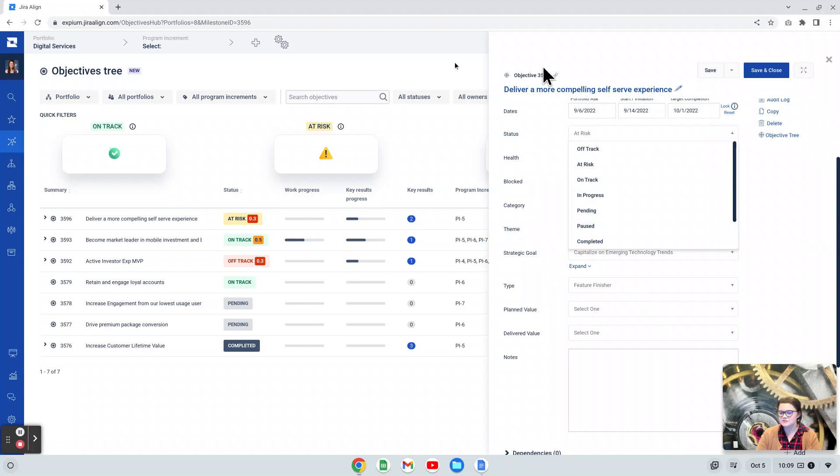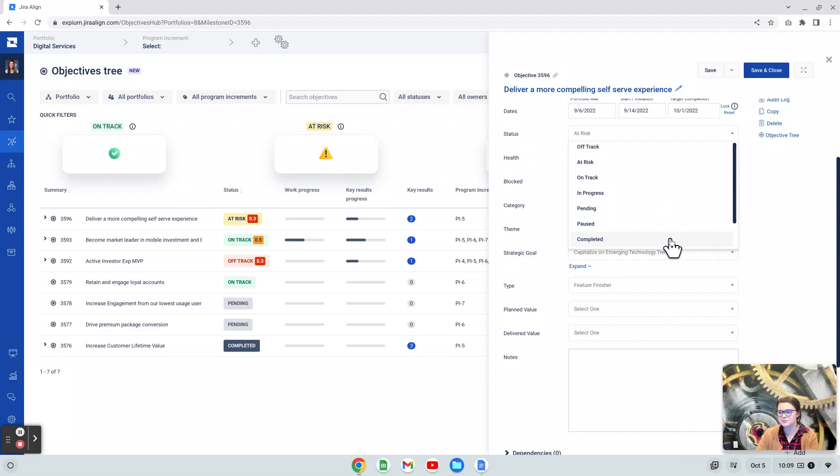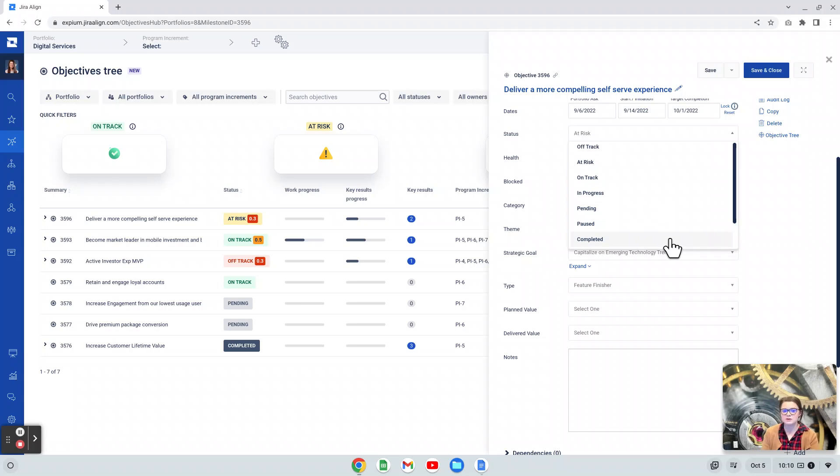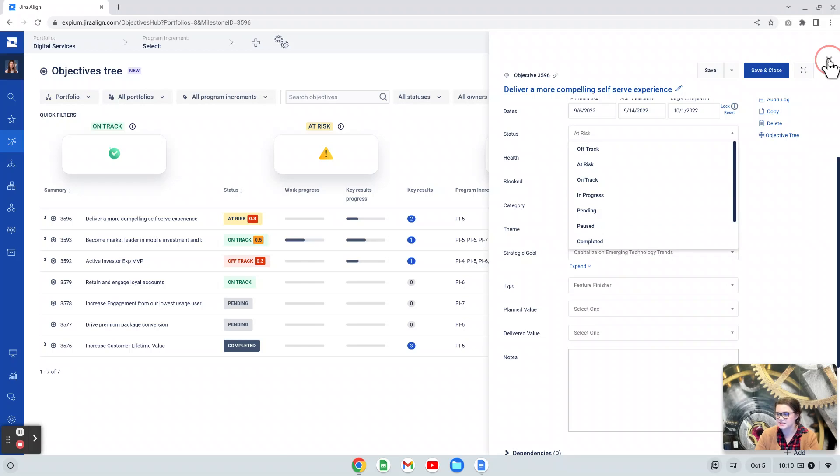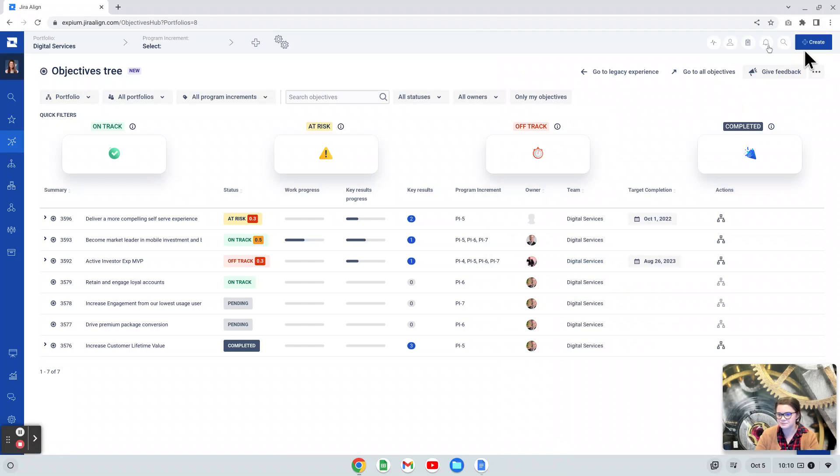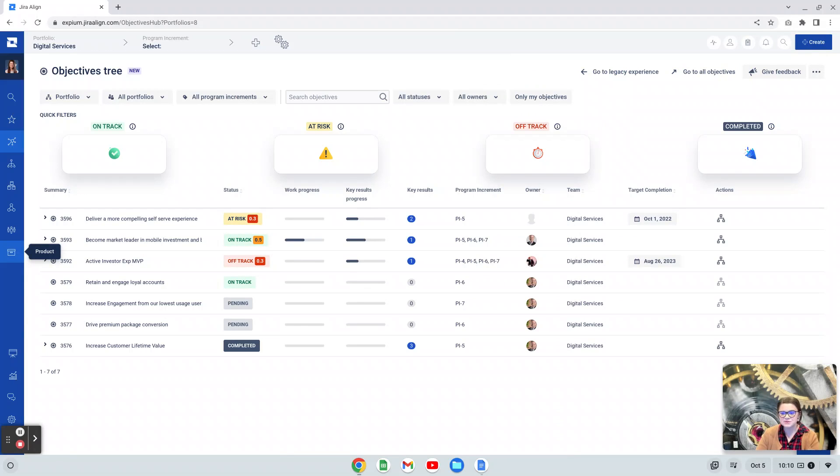On the objective tree view, these quick filters of on-track, at-risk, there's also one for off-track, and completed, do work specifically with those specific statuses. So the first three you see here and then completed. The other statuses that you have, you can still absolutely use, they just will not be included in those quick filters. If you're planning to utilize those quick filters heavily, you may want to work with your users to make sure that they are selecting those statuses here. You'll also notice that next to some of these statuses, there is a little number and that number deals with the check-in score from the objectives key results.